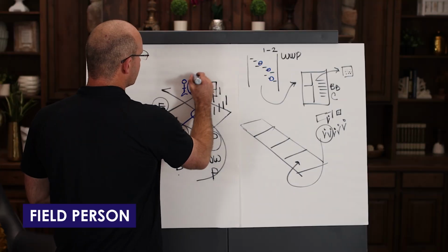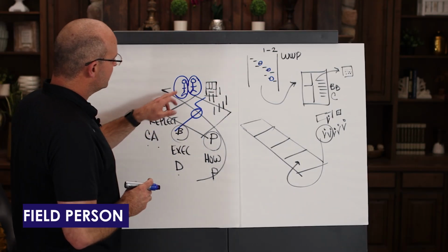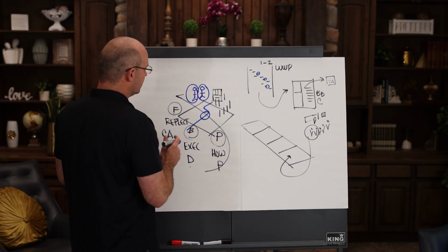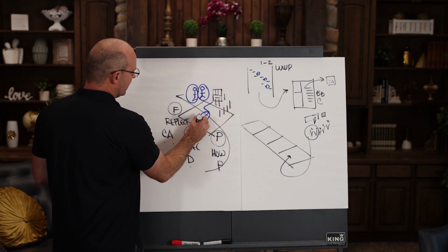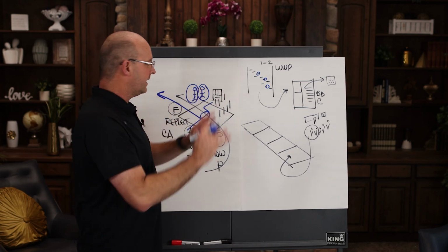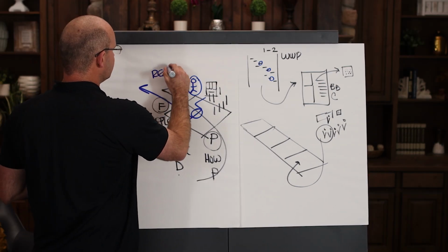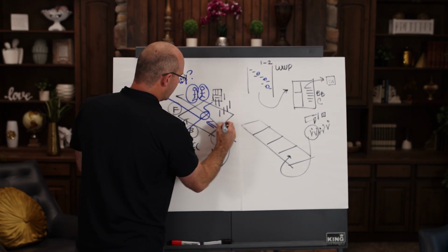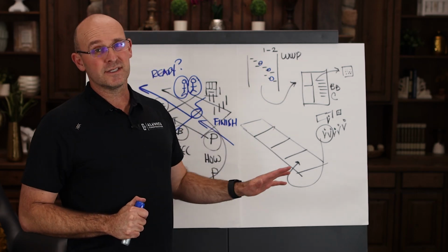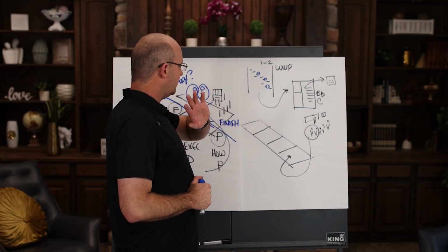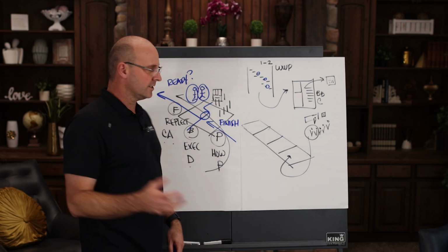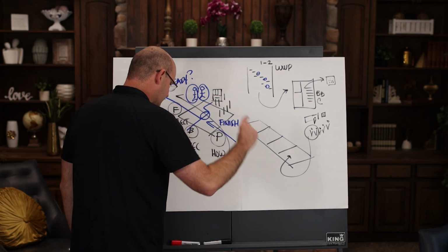Your field person will come talk to the amazing foreman, who is your value add person, the hero, the king on the job site. And what will happen here is you will talk to that individual and say, is work made ready out ahead of you? Is it clear? Clean, safe, organized, ready. Is this ready for you out ahead? The other thing is, are you finishing as you go? Remember, plan, build, finish. The only way I can properly say it is that punch list is a satanic lie. It's literally 30 additional steps if you leave work that could have been finished. We don't punch at the end of the job. Right there when the crew is there, let's get it done.